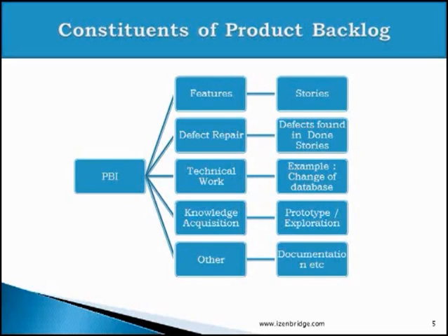Even if the product owner wishes to create a brochure or a document in order to help the installation or to promote the product, that can also constitute a product backlog item. Even the documentation work can also fall under product backlog item if it is not part of your done definition. So any item which product owner wants a team to work on comes under product backlog item. Product owner prioritizes them and team works on them.